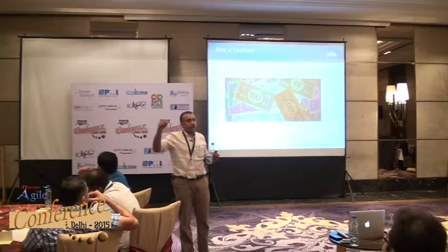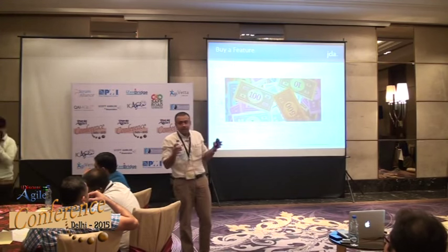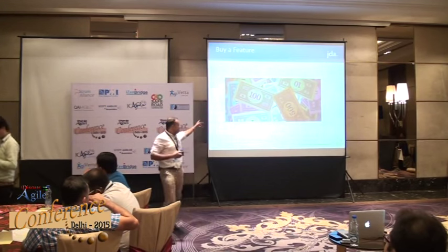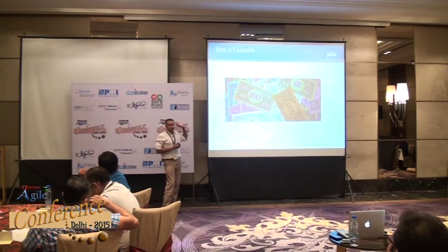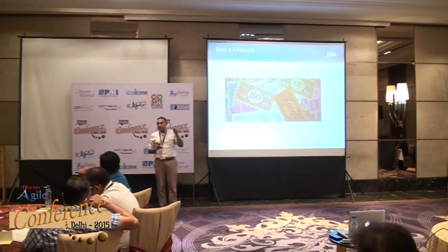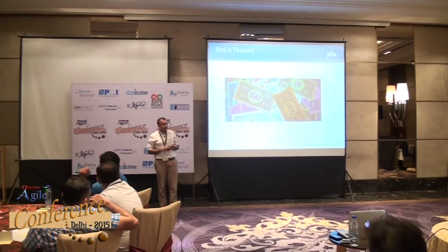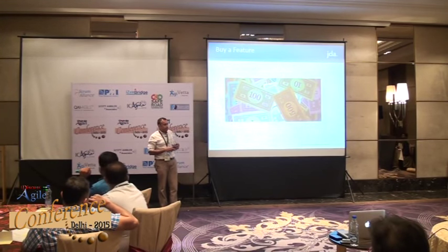So you have to find which one has more value. We give this fake currency to the customer and say these are the values, these are the features. You put money accordingly, whatever you think is going to make money. If your customer gives the same currency everywhere, there may be problems, so don't give the same currency to the customer. There's a reason.